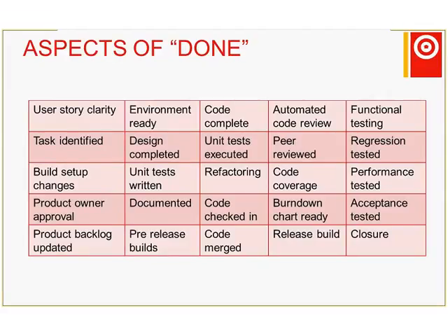It can only be done if the design is completed. Have the unit tests been written? Has the code been documented? Is the code completed? Do we think there's any missing pieces of it? How many of the unit tests have been executed, and what portion of them pass? We need to think about regression testing. Done might require that all the unit tests or 90% of the unit tests pass.